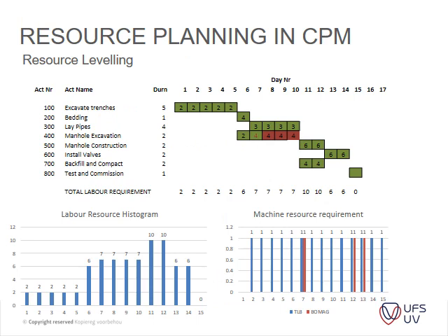And then the simple solution, without going into too much depth, is you just level out your resources and your TLBs, and what it causes your project to do, I think it's the pipe laying, is it just moves out one day, together with your excavations, which moves the project by 1 day if you level it to 1 TLB, and if you level your laborers to 8, like there. I just want to see why it's still adding that up.